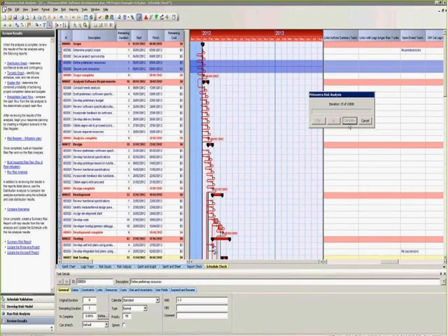So we're going to say complete, and we're going to tell it that we want it to run 10,000 times. But because we told it that once it converges on a specific answer, it can stop running, it might stop much earlier than that, still giving us the precision that we needed. So we're just going to let this go. While it's doing that, I'll explain what it's doing.